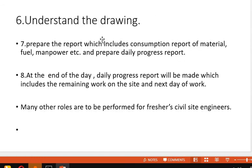The next duty is to understand the drawings. As a site engineer, you should know the drawing concepts so that you can perform your tasks. The seventh duty is to prepare the daily progress report, which includes materials, fuel, manpower — what amount of materials is left, what amount of manpower is left, what they are doing. This report is made at the end of the day and includes the remaining work on the site and the next day's planned work.